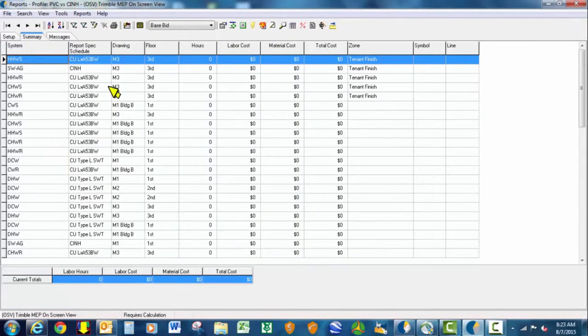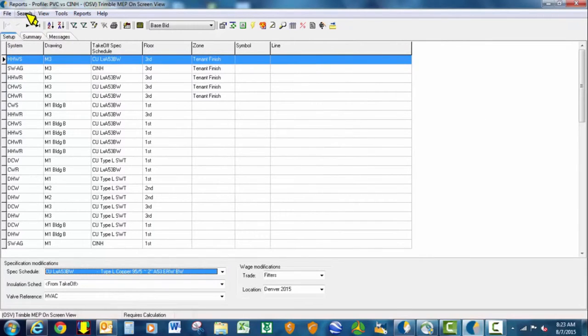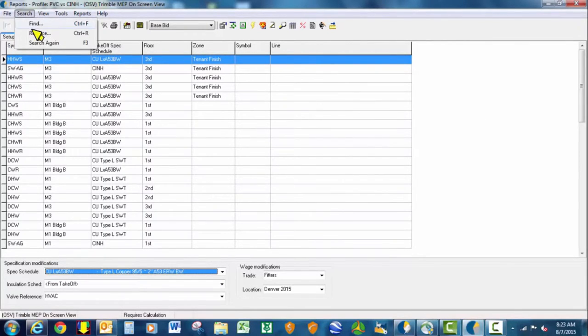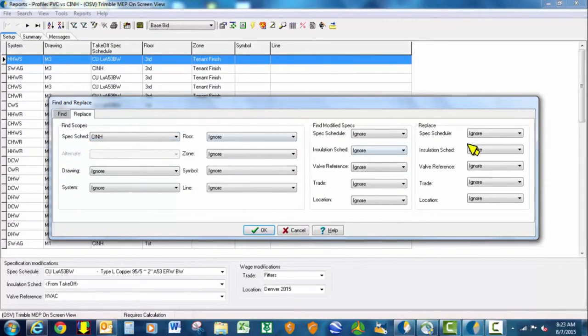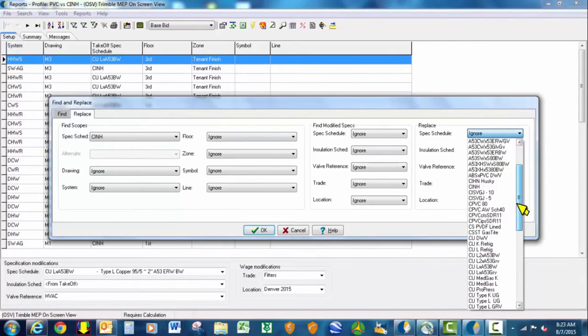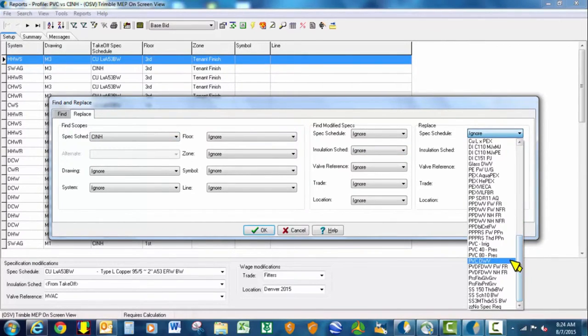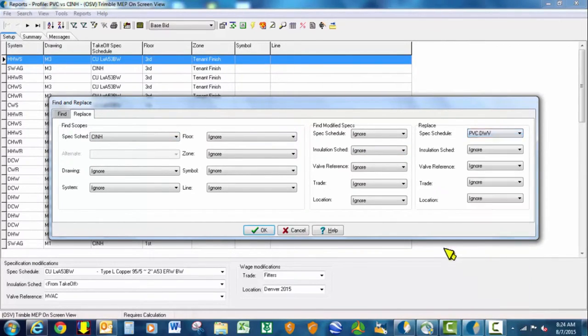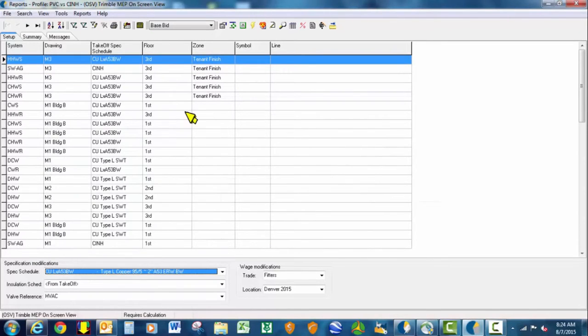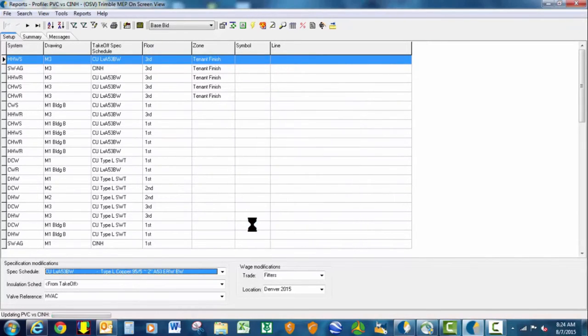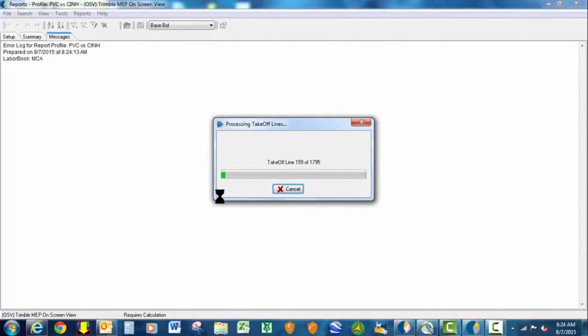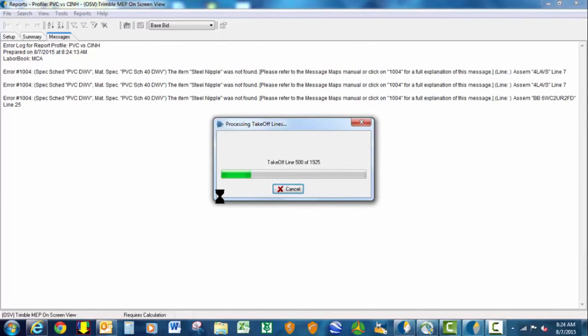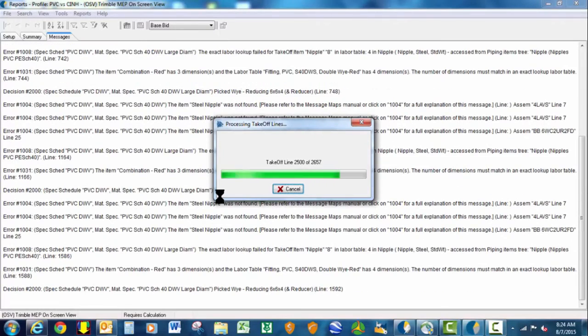We just made a new template, and now we're going to look for all of the cast iron no-hub and switch it to PVC. We'll come up here in the PVC versus cast iron profile, under search, replace, look for the cast iron no-hub spec, change it to PVC DWV. The beauty of this is you are changing it outside of the takeoff. The takeoff stays pure, yet in the reports you can do all these value engineering scenarios, which gives you a tremendous opportunity to offer your clients different options.